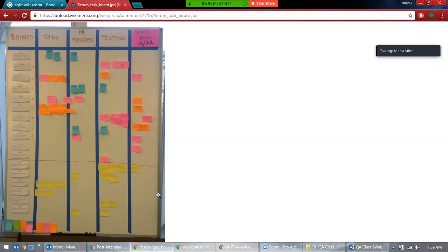If you have 6 members, it's good. If you have more than 6 members, better create another team, Scrum 2, and assign them the work. If it exceeds that again, create a Scrum 3, then Scrum 4, and so on. Better to create more teams, because you want to do a lot of work in small chunks of time. You don't want too many people doing the same thing, with these many user stories.